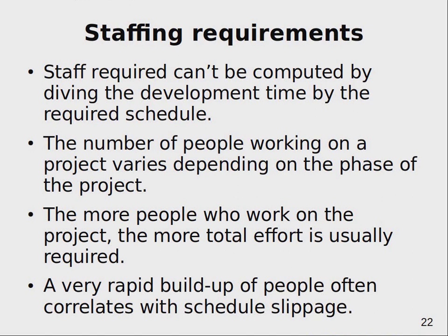So remember Brooks' law: adding more persons at the end of a project will just make it delayed or even later. Adding more people to the project means that you will spend more person hours on the project, but it doesn't mean that you will get more things done.